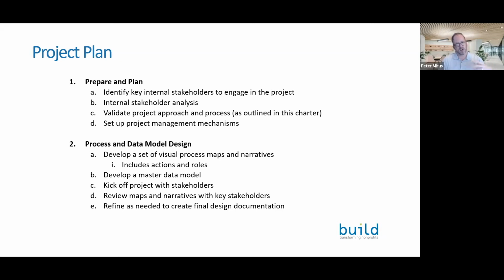And the reason for that was that we had already done an extensive constituent journey mapping project with this client as part of a previous effort. So they were already engaged. So we didn't need to do the kickoff with them at the very start of the project, just when we had already completed part of the body of work that we were going to bring back to them in terms of the process and data model design, and re-engage with them at that point. So ordinarily, you'd see that kickoff during the prepare and plan section of the project.